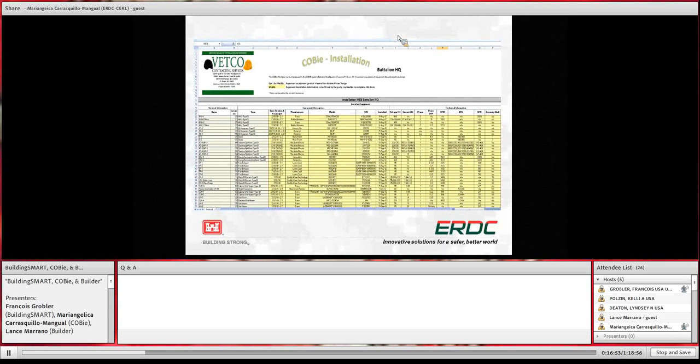Right now we know this is the requirement for the USACE. They have to provide this in RMS. So we are matching those requirements, including, okay, what is the spec section? What are some of these other attributes that it has to provide? Because again, the idea is to not double enter information.